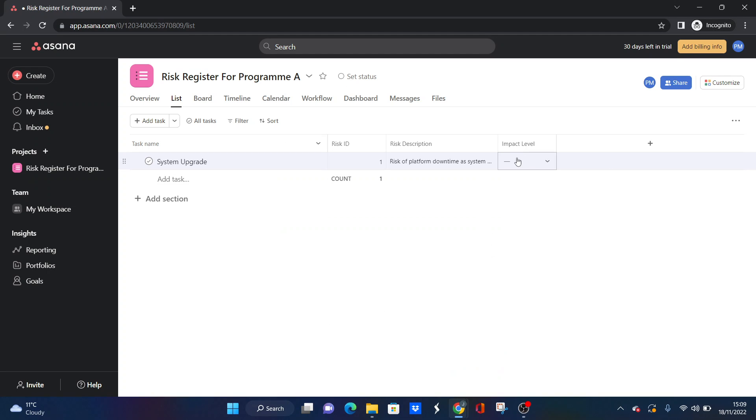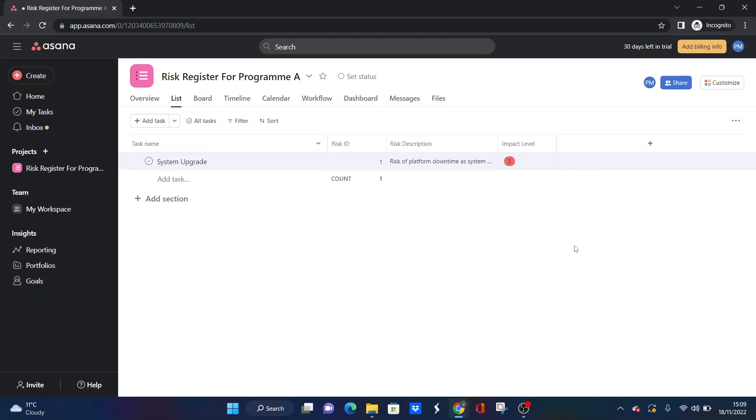So now we've got an impact level. Let's just say in terms of the system upgrade, if there is downtime, that's going to be big. That's going to cause a lot of issues. Our project managers aren't going to be able to work in their system, so the impact level is five, as an example.